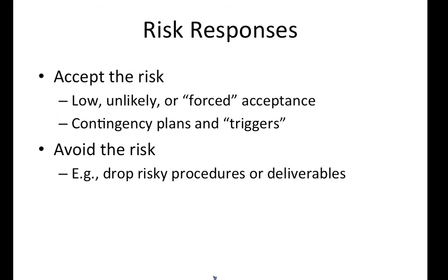When projects accept risk that may have a high negative impact, it is worthwhile to think through a contingency plan to use in case a problem begins to emerge. Triggers are events that signal a problem is beginning to emerge. It is best to think through contingency plans and triggers in advance to catch a problem early and to have thought out how best to approach it. Although these plans may be altered in light of new facts, they provide a better base of action than a reflective response in the heat of a battle.